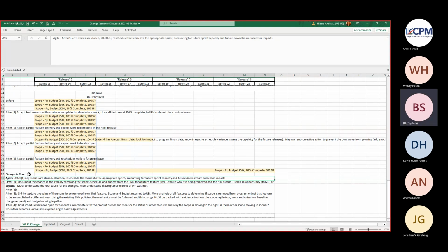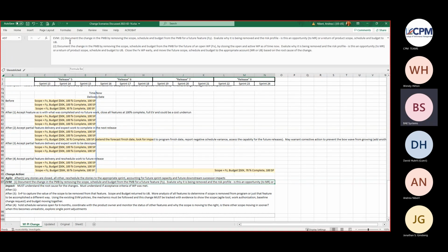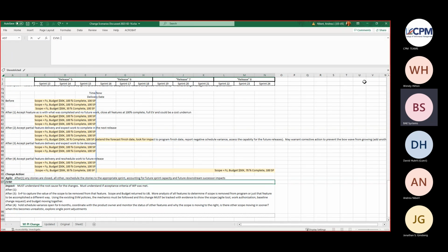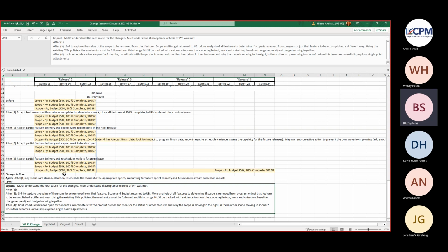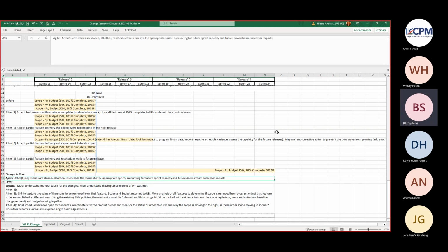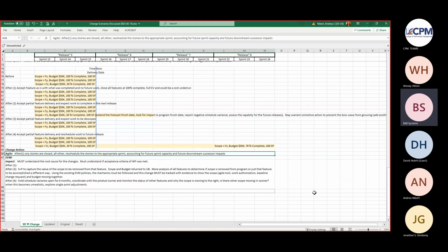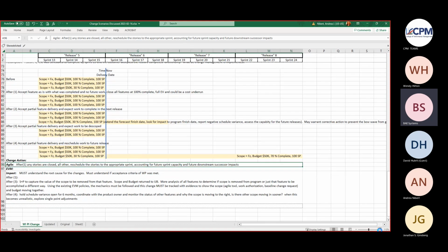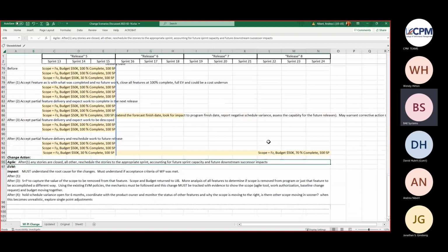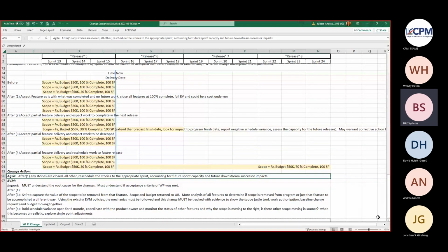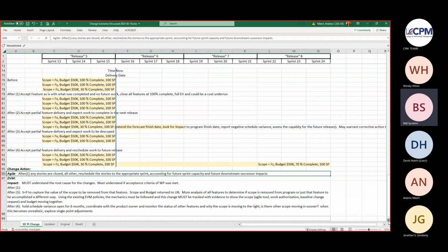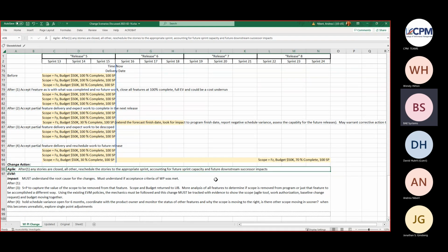Hey, Andrea, when you're talking about closing stories out, sorry, I can't see exactly what you typed. Do we want to address if there are stories out there that we didn't do the work for, and we've deemed we no longer need to do that? Are we going to recommend that those story points are removed? Because remember, we're trying to use those story points as the weighting for claiming EV too. Is there some guidance or some notes we'd want to write on that?